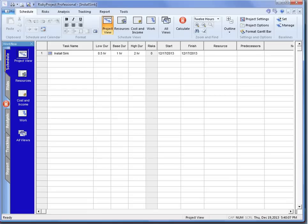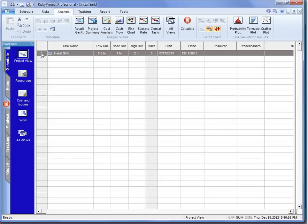Now what I've done in the software Risky Project Professional, I've just created that install sink task. And you can see that what we have is a low duration of half an hour, base duration of an hour and a high duration of two hours. And if we quickly run a simulation, because there's only one activity it occurs incredibly fast, we can take a look.